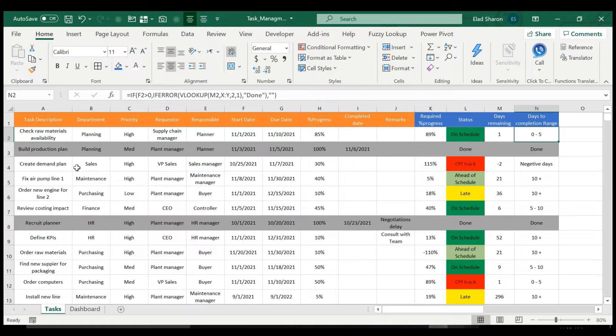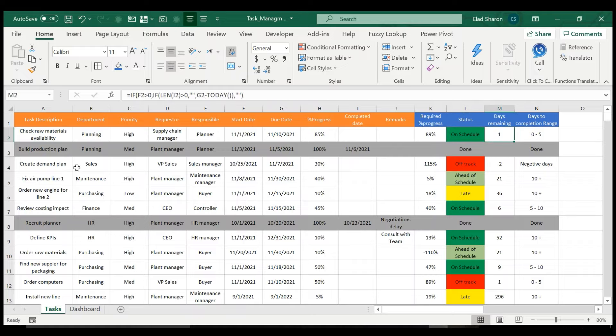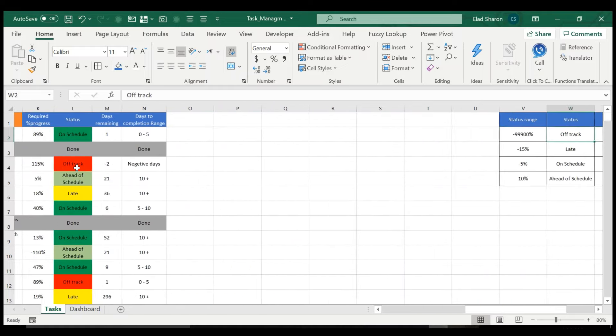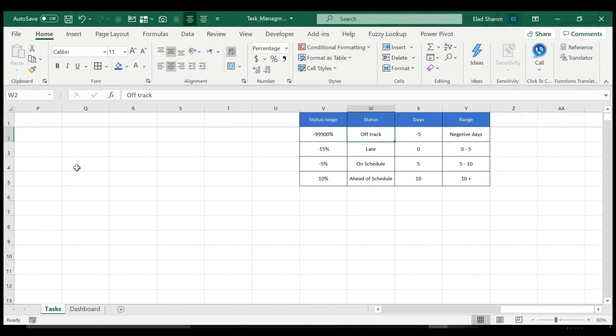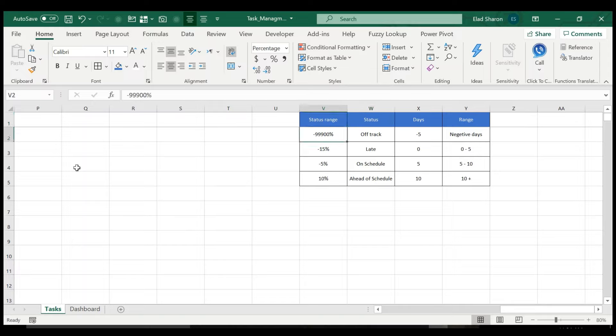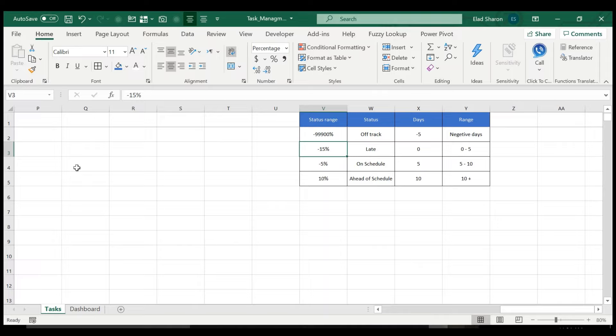And this is a range showing you what is the range between zero to five. Now, I'll show you how I've done these two. I've done them over here. I have two helping tables. One is for the status range and the description. So from my perspective, negative, meaning days behind should be off track.